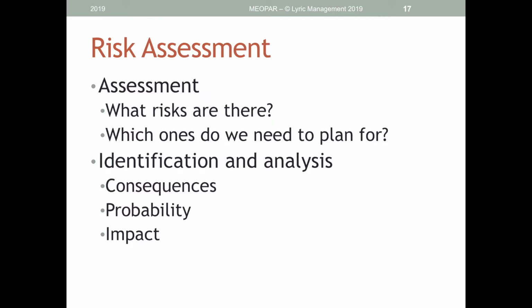And then the overall impact. What else would change about the project if that PI were to depart? Would there be a risk that the money associated with the project would be terminated because it was associated directly with that individual? So not just a change in leadership, but all of the other activities on the project would be affected by that. So we would do that kind of analysis of a risk and then determine how much effort we have to put into planning to mitigate that kind of a risk.